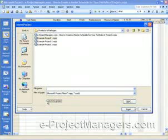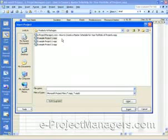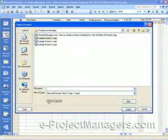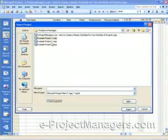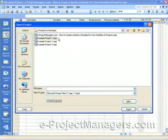then once you insert the project schedules, then you can make changes to the project schedules while you're inside the master schedule. If you check it on, then when you make updates to the individual schedules that you can open up at a different time, those changes will be reflected in the master schedule.